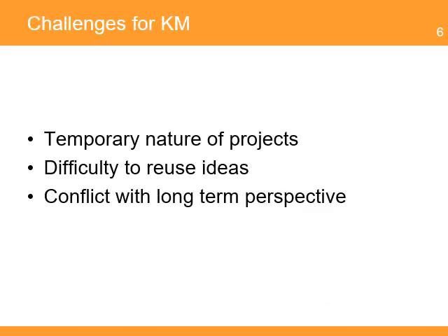But the use of knowledge management is not easy. A significant challenge for using knowledge management in project-based organizations is the temporary nature of projects and the diffusion of project teams once the project is completed. This is a significant obstacle for organizational learning that limits the opportunities to use knowledge. Ideas and solutions created in a project are often difficult to analyze and use in other projects.